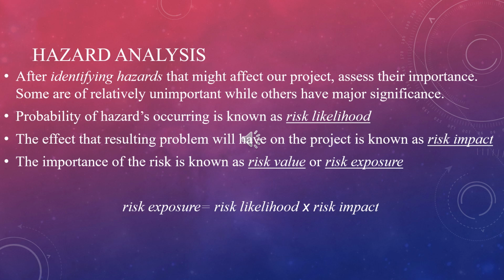Ideally, the risk impact is estimated in monetary terms and the likelihood assessed as a probability. In that case, the risk exposure will represent an expected cost in the same sense that we calculated expected cost and benefits while discussing cost-benefit analysis.